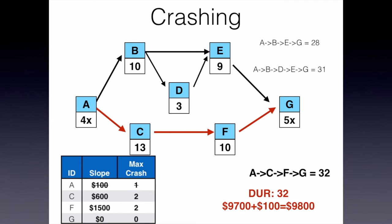Adding up all the values, everything has been reduced by 1: A-B-E-G is now 28 days, A-B-D-E-G is 31 days, and A-C-F-G is 32 days. So I still need to reduce something on the path A-C-F-G, remembering that A can no longer be crashed and G cannot be crashed. It looks like I'm going to be crashing task C — reducing that by 1 and adding $600 to my overall costs. I don't put an X after it because I can still reduce it by one more should I desire to.